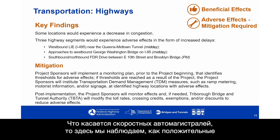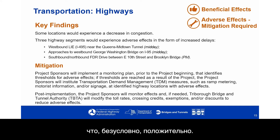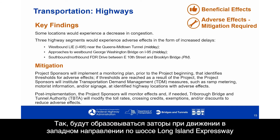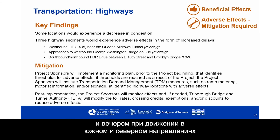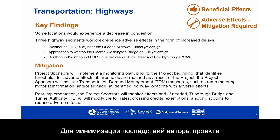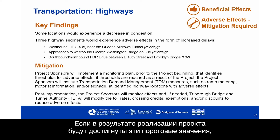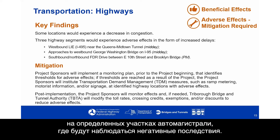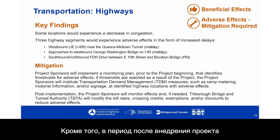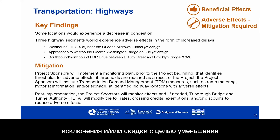With respect to highways, there are beneficial effects and some adverse effects in a few locations where mitigation is required. Three highway segments would experience adverse effects in the form of increased delays: the westbound Long Island Expressway near the Queens Midtown Tunnel at midday; approaches to the westbound George Washington Bridge on I-95 at midday; and the southbound and northbound FDR Drive between East 10th Street and Brooklyn Bridge in the evening. For mitigation, project sponsors will implement a monitoring plan with thresholds; if reached, they will institute transportation demand management measures such as ramp metering, motorist information, or signage. Post-implementation, TBTA may modify toll rates, crossing credits, exemptions, or discounts to reduce adverse effects.